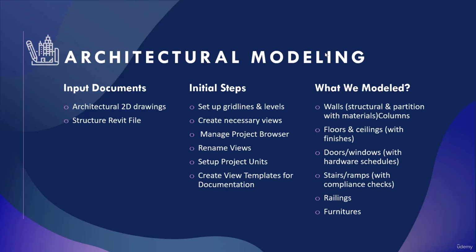Now, in order to start our architectural modeling, what do we need? Of course, we need the plans of the phase 2 and the phase 1 architect, which are produced in CAD. Then we enter them into Revit and start our architecture modeling. We have to link our models to this file so that, as we are modeling, interferences can be identified, reported to the team, and applied at that moment. This becomes one of the most important features of working in the BIM system.